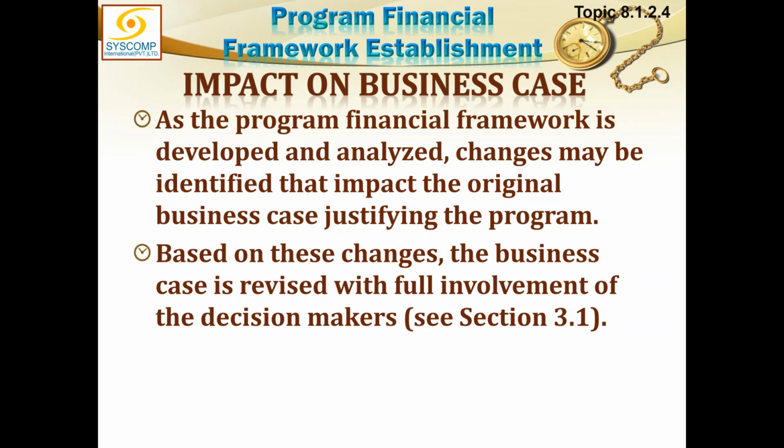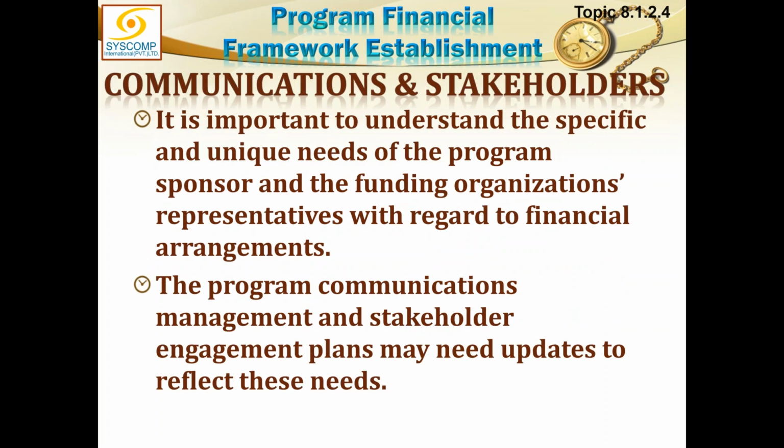A good financial management plan for the program would ensure that. And what is the impact on the business case? As the program financial framework is developed and analyzed, changes may be identified that impact the original business case justifying the program. Based on these changes, the business case is revised with full involvement of decision makers. So no financial framework was there when we created the business case. Now, when we have an efficient financial framework created, the business case may have to be reviewed and may be revised.